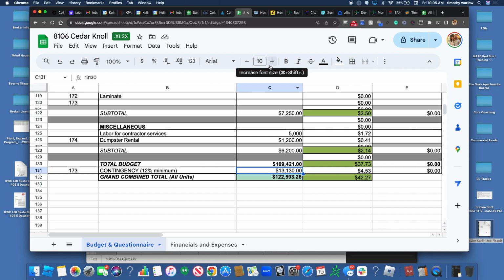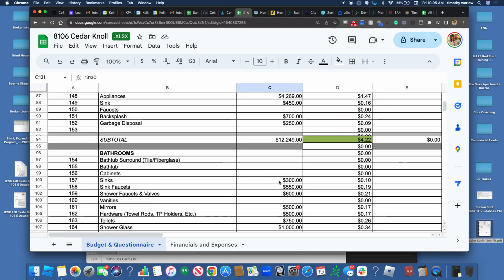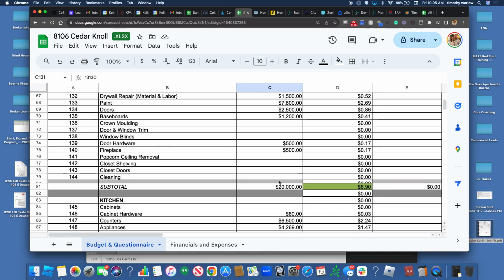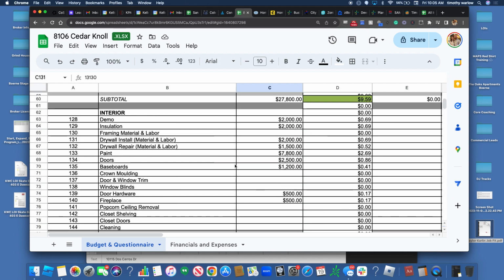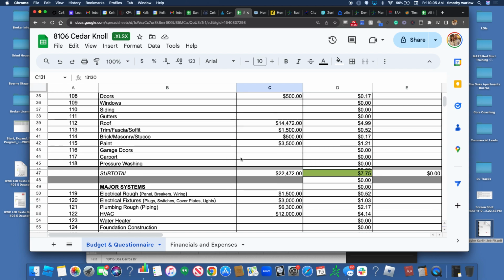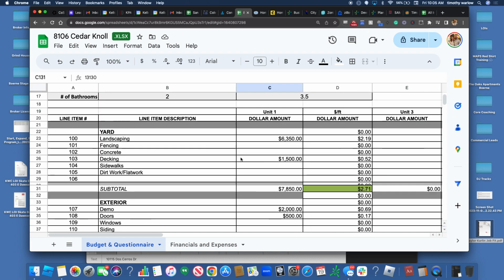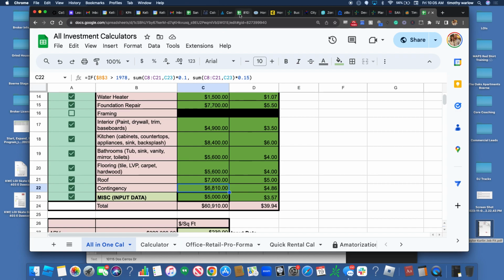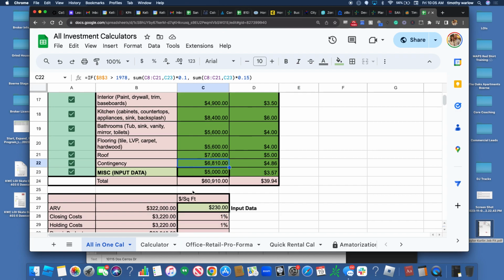Wow. So you do have to be very accurate. Yeah, we're talking about cabinet pulls. So they wouldn't give us the kitchen budget, even though he noted that they're $15,000 sitting in the kitchen, ready to be installed, but they were not installed yet. Because theoretically, you could just remove them from the property. Yeah, and the same with the appliances. The appliances are in the garage, and he wouldn't give us the money for it. And I was like, they're heavy. I moved them in there and installed them.